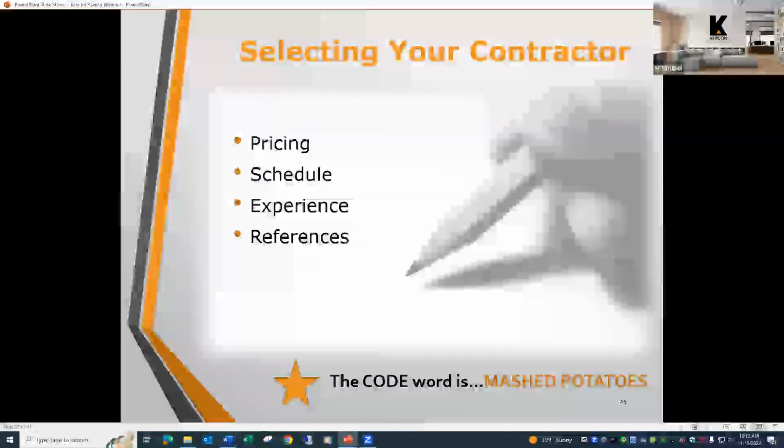In the project manual, the bid form, we ask for references. Nobody, of course, is going to give a bad reference, but it gives you an idea of the type and scope of projects that contractor has done before. Have they only done parking lots? Have they only done pothole repair? Or are they equipped and capable of doing a good job on your roadway project that may require a little more in-depth construction?